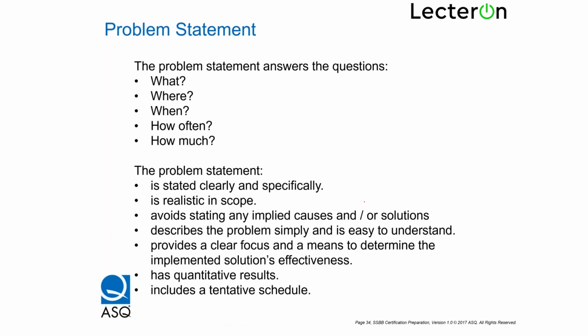So the problem statement is stated clearly and specifically, is realistic in scope, avoids stating any implied causes or solutions, describes the problem simply and is easy to understand, provides a clear focus and means to determine the implemented solutions and effectiveness, has quantitative results, and includes a tentative schedule.